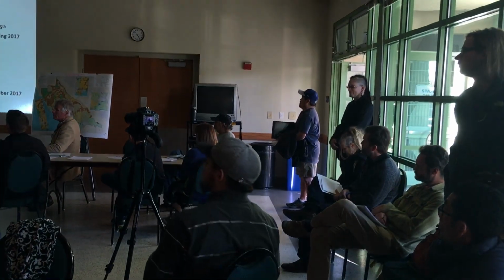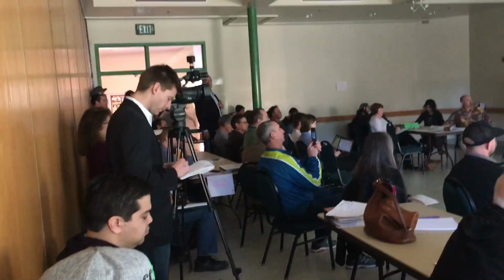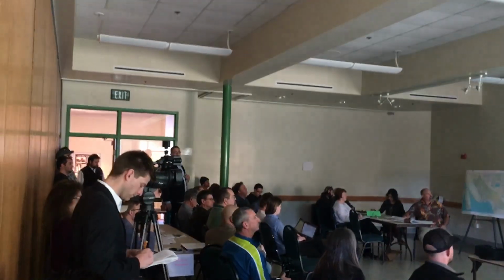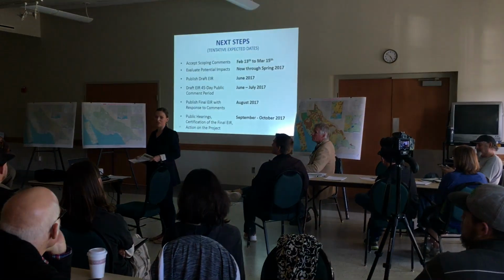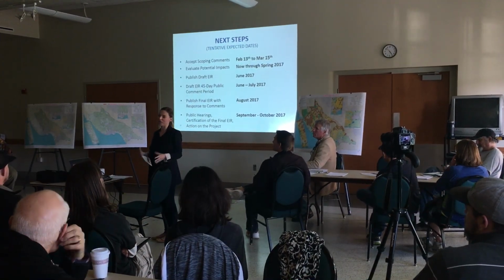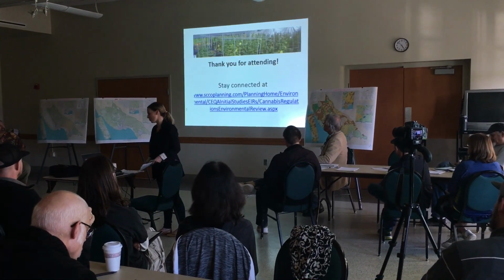You can expect the final EIR with a response to all the comments and edits in response to public comments in about August, and then the Board of Supervisors and the Planning Commission will have hearings in September, October of this year to consider the whole of the project, including the conclusions of the EIR. So plenty of opportunities to stay involved, and I hope you do.